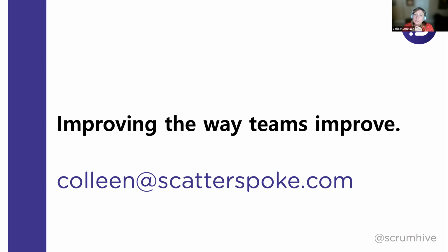Yeah, I would say one of the more common tags or themes to sort by is people, process, tools, technology. Sometimes I see environment in there. Those are very generic, but it depends. If you're pulling retros from an ops team, a security team, and engineering teams, you need them to stay a little generic so that everything can roll up. And that's a nice place to start.